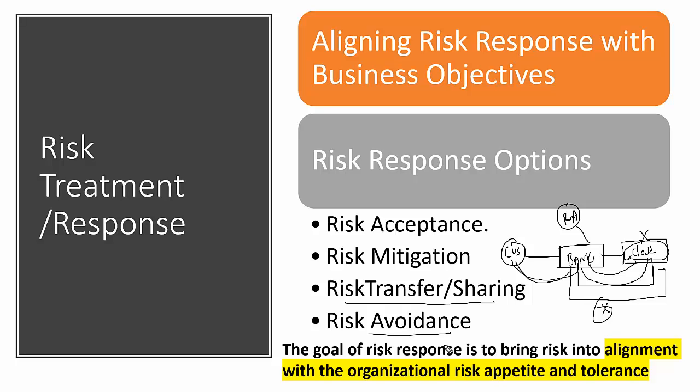So keep in mind, the purpose of defining a risk response is to bring risk within the enterprise-defined risk appetite and tolerance as cost effectively as possible, not to eliminate or minimize the risk at all costs, because risk elimination is not possible. All your response activity incurs some cost, typically a mix of direct cost of response and potential cost of impact.